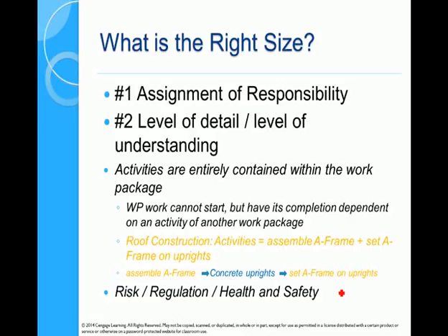So we'll subcontract an electrician and say, you're on the work package with the land clearers, the concreters, the plumbers, and the people getting regulatory approvals from the local council. You're all on this work package. What happens with that is that nobody takes ownership, because nobody's really sure that they actually own that work package. So assignment of responsibility is the key thing.